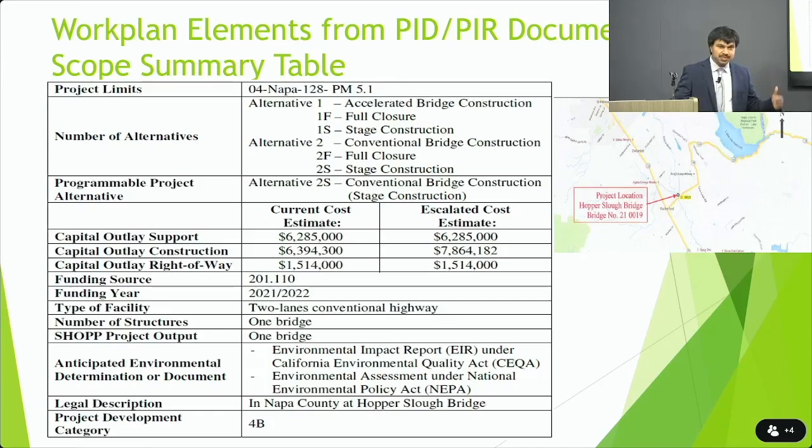But if you're adding a new lane, or adding new guardrails, or, I was thinking about the CHP ramps, the pockets they create for pull-out areas. Anytime you're going into undisturbed soil areas, it triggers higher level environmental document requirements.